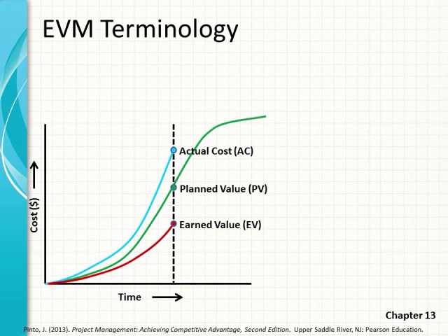So here's an illustration of those three basic values: the actual cost from accounting, the planned value from our plan, and the earned value of the actual products we've produced up until that point in time. Let's just give those some simple values for now to help us understand those two calculations we talked about earlier.